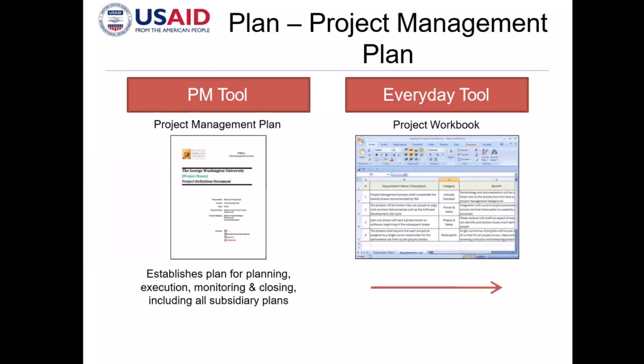So the project plan, if I will again use my analogy in a contract, the project plan is a contract that is already notarized. This is the real thing. So once you turn over the project to your stakeholders or to operations, what they will look at is the project plan, if all the requirements in the project plan were served or not. Otherwise, they will not accept your project as completed.